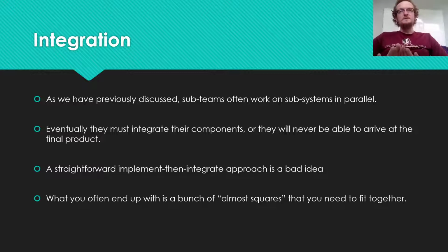So what we want to do is come up with an integration strategy that allows us to perform parallel work, but then also integrate as early as possible so that we understand the actual shape that these subsystems need to take in order to be stitched together into the correct final product.